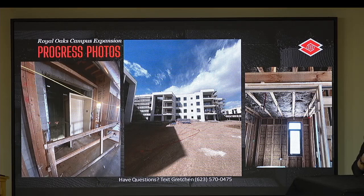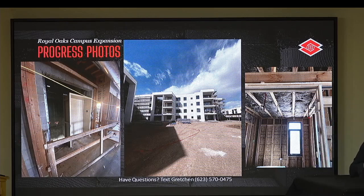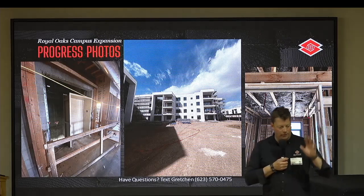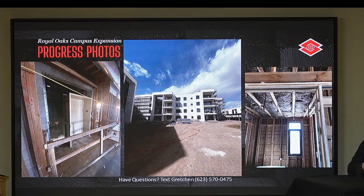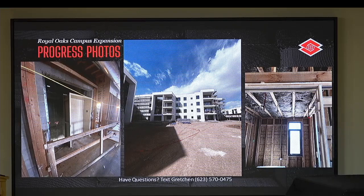If you guys that have been coming to these meetings for a while, way back in April of 2021, we went ahead and flew what was known as a jack shaft. So it's a big, long hydraulic ram, 55 feet long with a 65-foot deep hole, 65-foot deep casing. We flew that in place in the elevator shaft while we were doing the garage work, and that thing has been sitting in the shaft, protected, and waiting for us to get to a point of construction where the rest of the hoistway was completed, all the floors were done, and the elevator guys could mobilize with a dried-in roof system and start putting the elevator in.